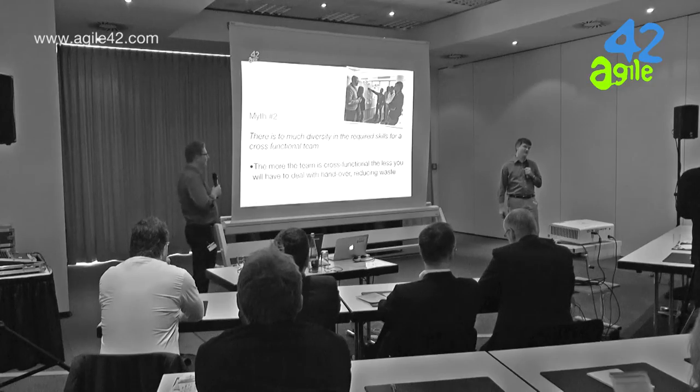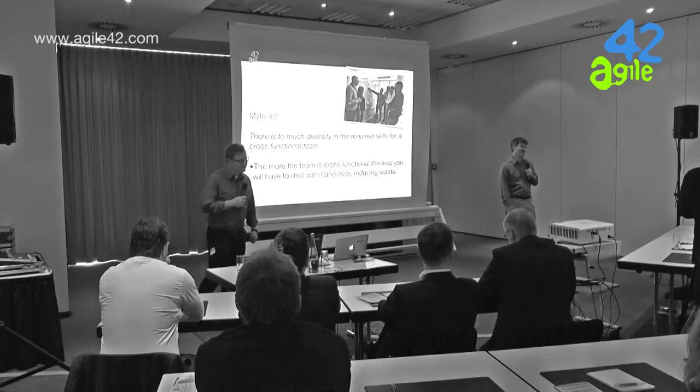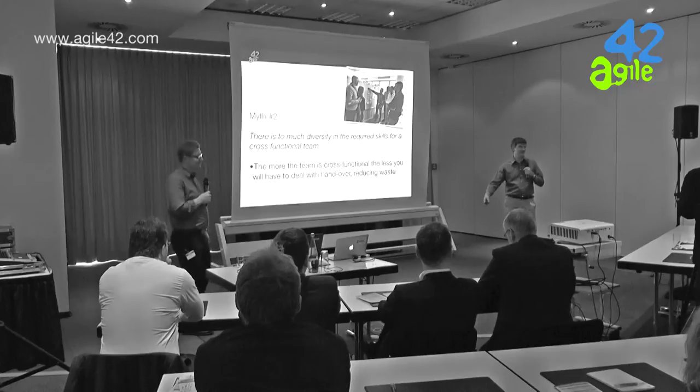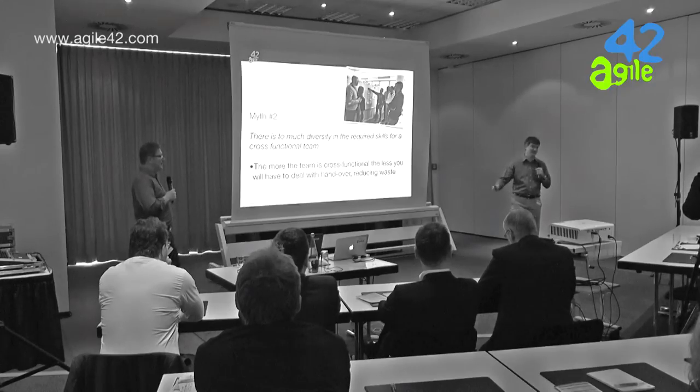So we did the firmware right, it doesn't work, it's a software problem. And then 1 week later, the software team does the debugging and says, no, it's not our problem, it's a hardware problem. And then the hardware guys go and look at the hardware, they do all the oscilloscope tests of the world, they measure the ripple and they say, no, our hardware works as specified, it's not our problem, it's a firmware problem. And then you keep on going like that, introducing a lot of feedback delays, and this is just killing the whole product development. The next one.